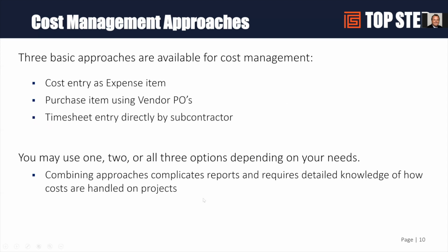You could actually just have a contractor's costs show up in an expense report. We've seen customers say, we're going to create a subcontractor expense item. We get a contractor invoice, and we'll create an expense report that will add the cost of that invoice for a particular contractor or group of contractors down to a project. This basically allows you to add the cost in OpenAir and report on that cost as part of your project profitability, but you're not paying for licenses in this case for the users. So this is one way we've seen customers add costs to their projects.